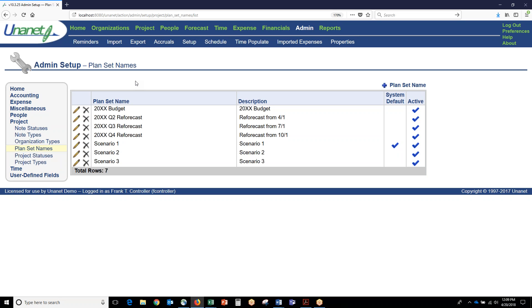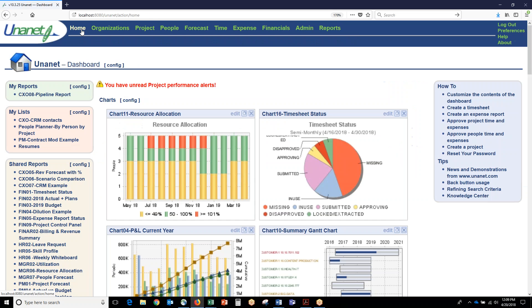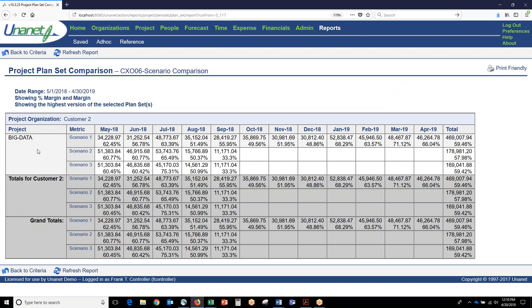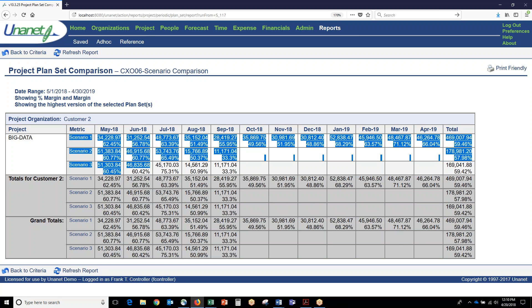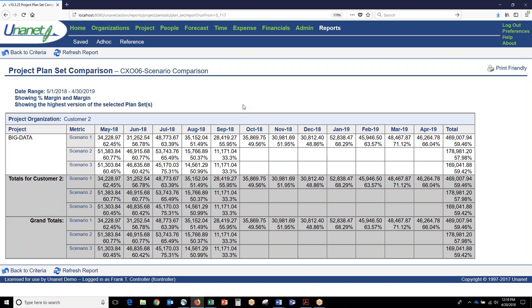You can also have plan sets. Our customers use plan sets for scenario planning or what-if analysis as well as quarterly reforecasting. An easy example of the plan sets is something like this: under the umbrella of one opportunity or one project, you could actually have multiple different scenarios and then you could compare the scenarios against each other. Which scenario is going to take the longest to finish? Which scenario is going to produce the least margin?